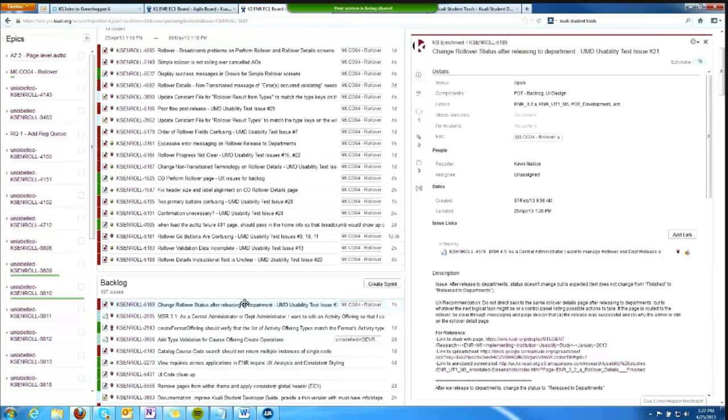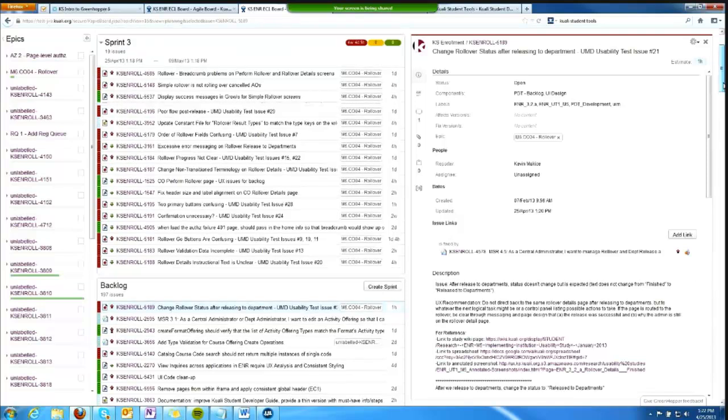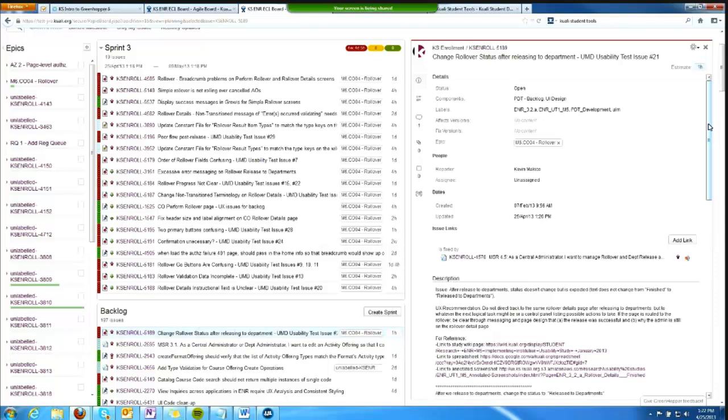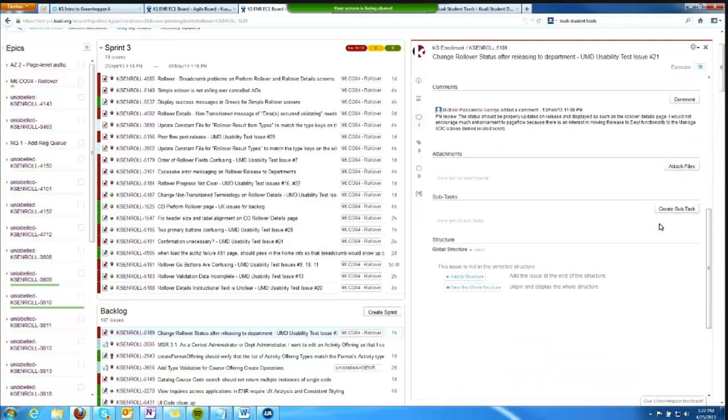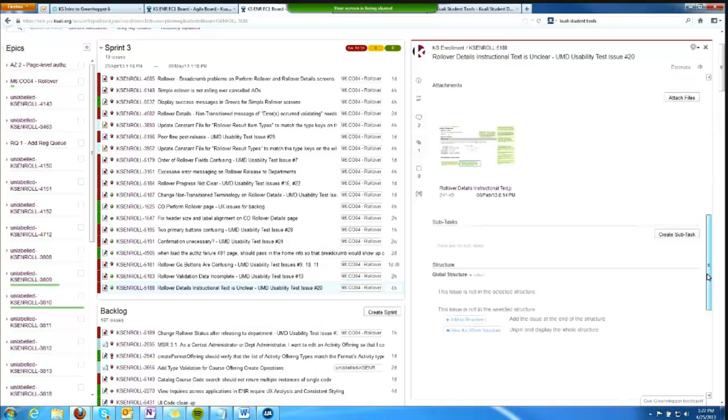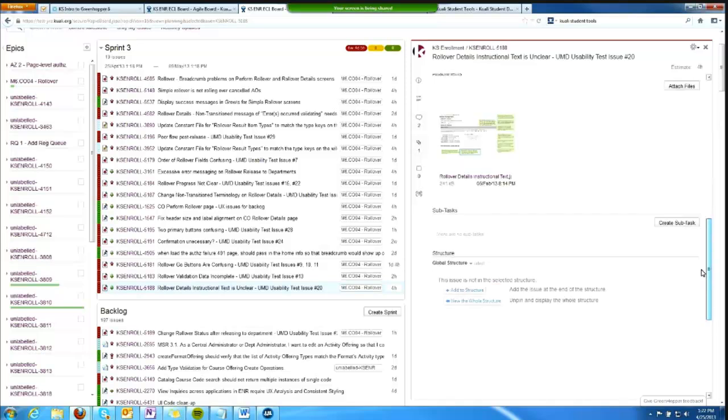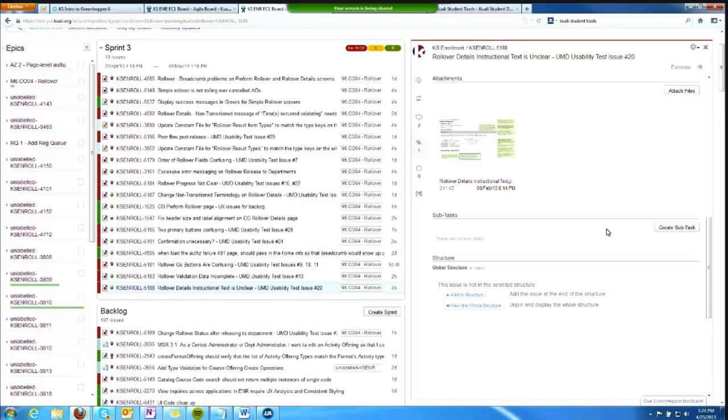Can anyone define start a sprint? It's just leads and POs. What Greenhopper supports is the entire team working on the task decomposition process. So any work that is in a sprint or planned for a sprint can have its subtasks decomposed, and they will automatically follow the sprint determination of their parent task. But since putting work into or taking work out of a sprint is inherently an active prioritization, it's limited who can perform that function.